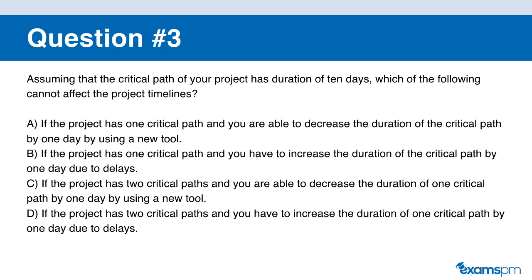Now let's move on to question number three. Assuming that the critical path of your project has a duration of 10 days, which of the following CANNOT affect the project timelines? A: one critical path, decrease duration by one day using a new tool. B: one critical path, increase duration by one day due to delays. C: two critical paths, decrease one by one day using a new tool. D: two critical paths, increase one by one day due to delays.